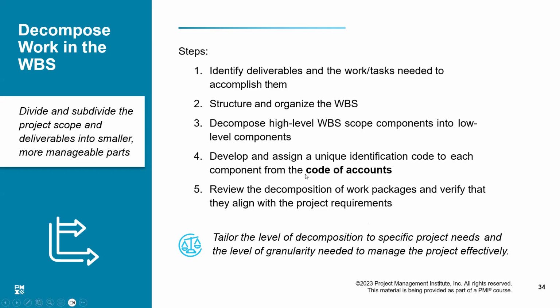The numbering system is called code of accounts. That 1.1.1 is a code of account. Whenever somebody has to refer to that 1.1.1, they will say the code number of that code of account.